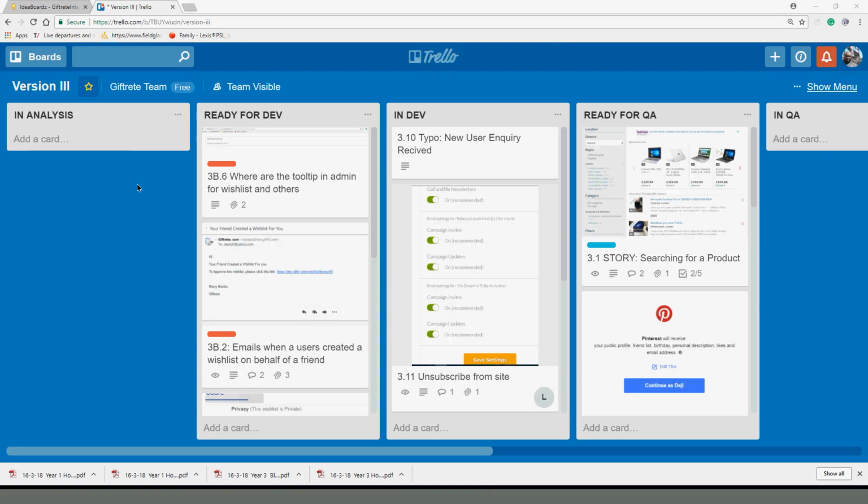Okay, so today we're going to do the grooming session. We'll also focus on Agile, on the different stages in Agile and how we need to do everything. On the screen, we see Analysis. Your story that you're about to start, or a bug, goes into analysis before you start anything. From there, we prioritize what needs to be done. I review them and decide whether this needs to go into the sprint or not. So we put everything there.